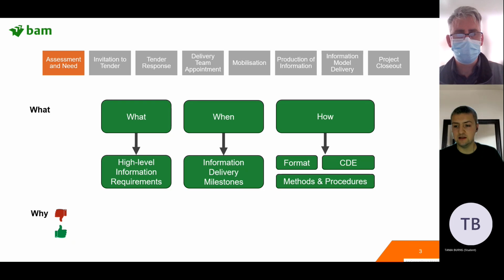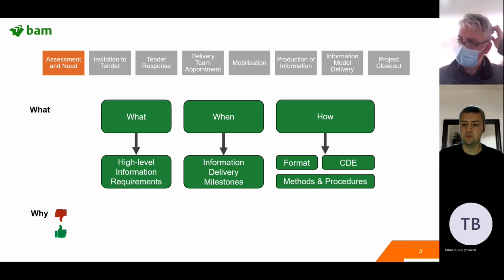The reference to CDE there, that's common data environment, and you can think of it as a kind of Dropbox type thing, really, because it's where everybody shares and exchanges information. So it's not to be done by email or WeTransfer or various other services. There should be a cloud storage place set up where everybody uploads and downloads their information, and any information exchange happens in that one place. Quite a simple concept, but you'd be surprised at how often it's just not done.